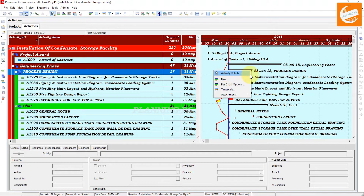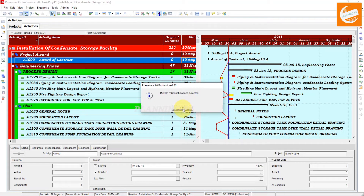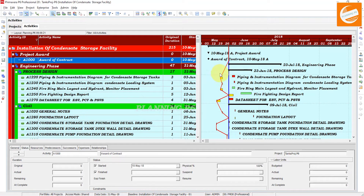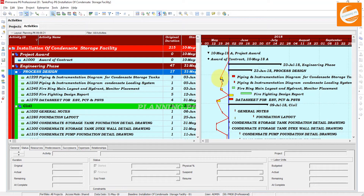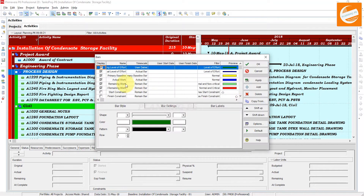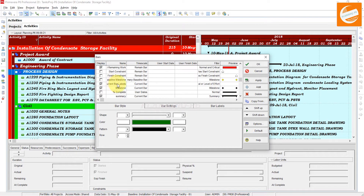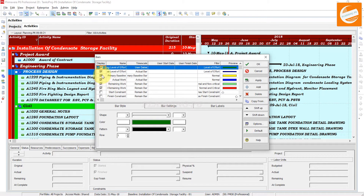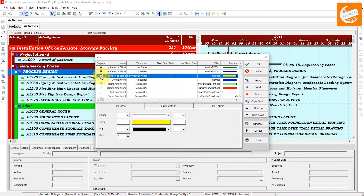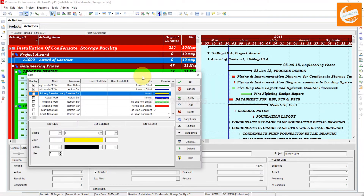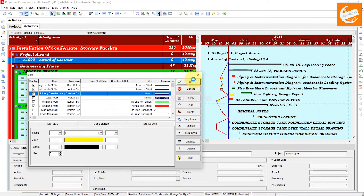You must show the primary baseline from the Bars settings. You have to check the primary baseline. If you have any other baseline, check here on the primary baseline. If you uncheck it, the progress line is not showing. You have to check it, then apply and OK.